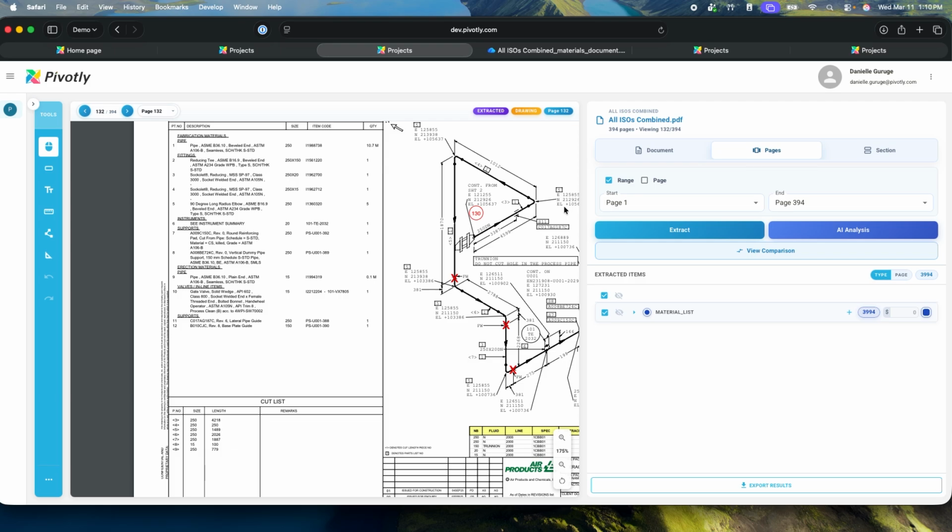In the internal review, we have found the sample produced a near complete export. The main edge case to watch for is occasional extra fragments caused by inconsistent formatting, but that's typically obvious to the reviewer and easy to filter out. The reason this matters is speed. If you can turn a bill of materials into a clean export quickly, you can get it out to vendors faster, get pricing back faster, and reduce the scramble that happens when a bid is due in a few weeks.